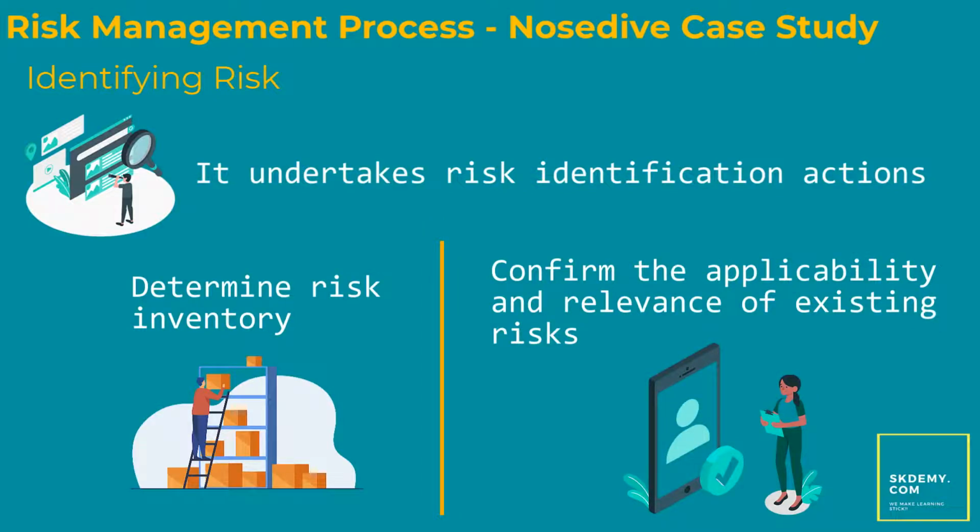With the progressive integration of risk management practices, risk knowledge and awareness are kept current through regular everyday operation. Sometimes these activities are repeated to confirm the completeness of the risk inventory. How often? That depends on how quickly risks change or new risks arise. When risks may take months or years to materialize, the frequency of identifying a risk will be less than when the risks are less predictable or occur more quickly.